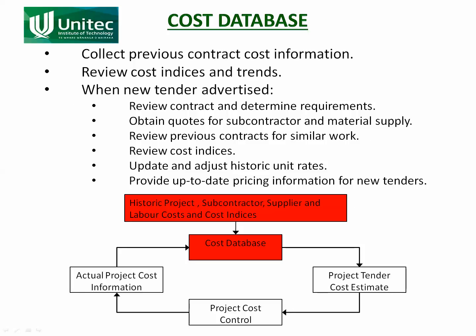Cost database is you collect previous contract cost information. You modify that for cost indices and trends. So as we discussed in the previous topic, prices go up, and it's important that you keep a track on that and you adjust those costs as required.